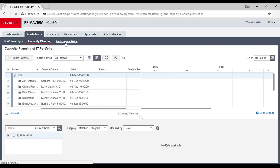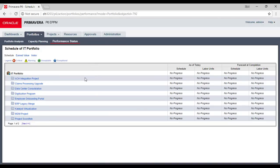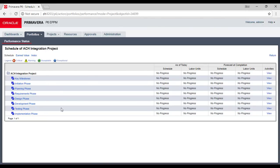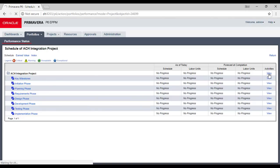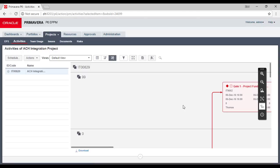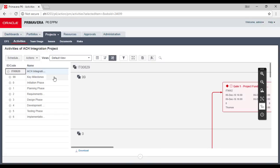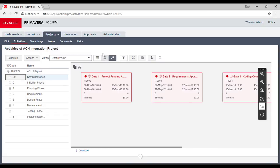The performance status gives you the portfolio status — whether it is updated or not. Going project by project, you see views per WBS, and any updates showing what is exceptional, acceptable, warning, or critical. This allows quick schedule analysis. If you want to go deeper into activities, you click View and it moves you to the activities details.